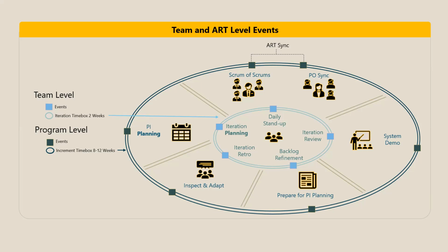Because even the PI system demo is not a status report, point 1, point 2, point 3, point 4. The business owners or the stakeholders are more interested in certain things. That's the reason they assign business value. We've not discussed that, but the business owners assign business value to objectives. So what we do is, in the order of priority or in the order of interest to the business owners, we put things in the agenda or in the bucket and say, this is how we're going to present it.